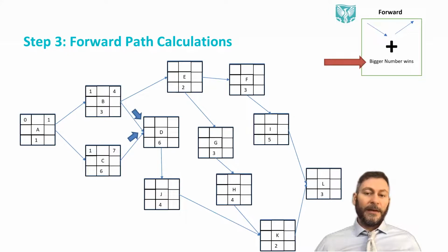You can see this is the bigger number wins. And in this case it is 7. So then you do the calculation. 7 plus 6 is 13. You pass it on onwards. But before we go to that as well, we look at